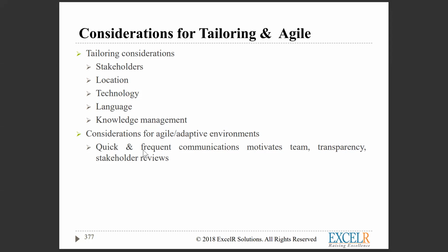It has to be done way before, your communication, your networking, everything. Your connections, internet connections, everything has to be done upfront, way upfront. We have to set up the production box and then the UAT box. This has to be done way upfront when you have those project plans.